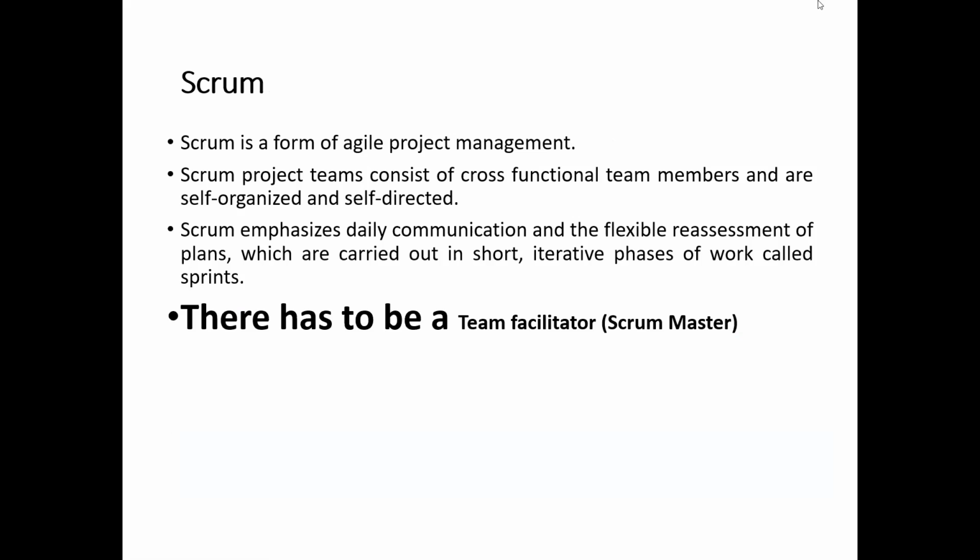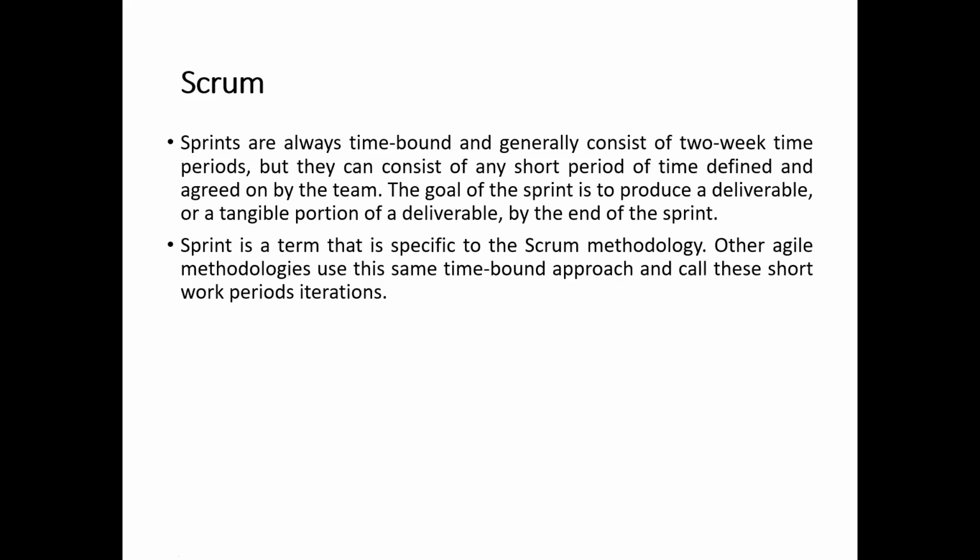There has to be a team facilitator, which is a Scrum Master. A Scrum Master acts as a project manager; in the predictive life cycle we call them a project manager. Sprints are always time bound, with fixed timings, and generally consist of a 2-week time period, but they can be any short period of time defined and agreed on by the team.